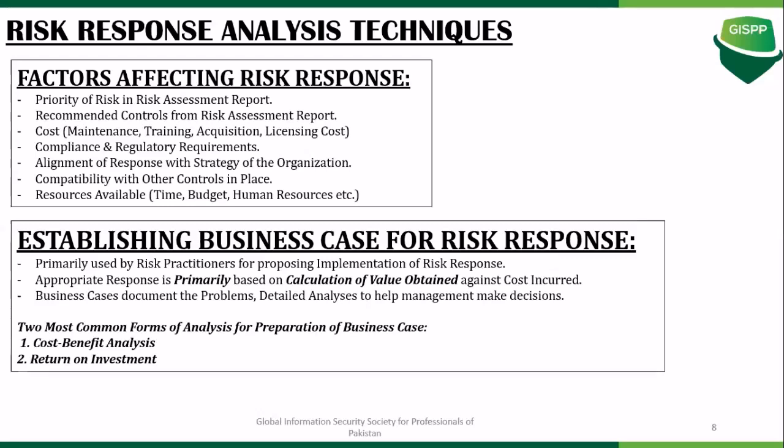Now, in order to go for a particular risk response, you need to establish a business case. These business cases serve as the tools against which you can evaluate and support investments throughout their life cycles. And two of the most common analysis techniques used for preparation of a business case are the cost benefit analysis, and the second one is the return on investment.